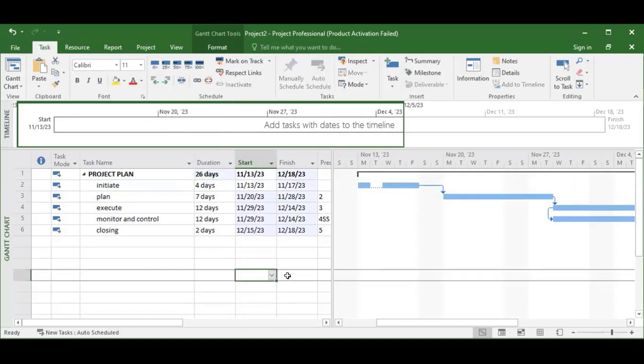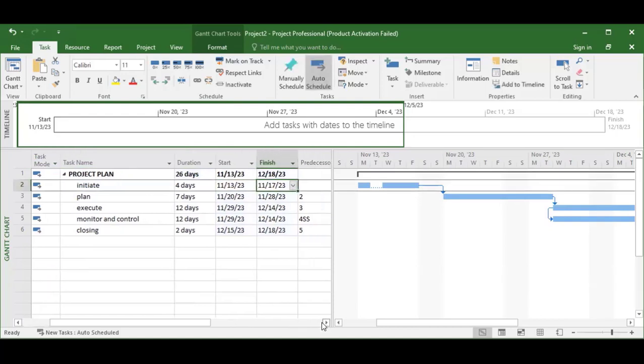Now, very, very important. More often than not, I've seen a program of work and people just prepare it at the beginning of a project, and that is all. It's not meant to be like that, okay? It's a working document, all right? The procedure is, at the beginning of a project, you have your time planning, and when it's approved, when you want to start that project, you save it as a baseline, and you are supposed to be updating it every now and then. As each activity is being achieved, you will do what? You will update them.